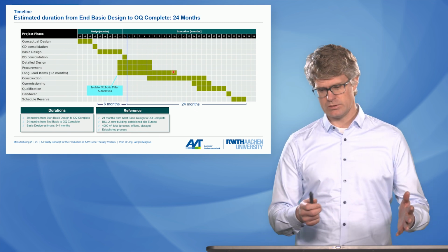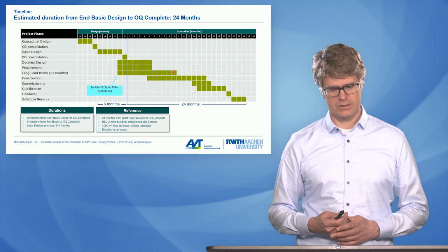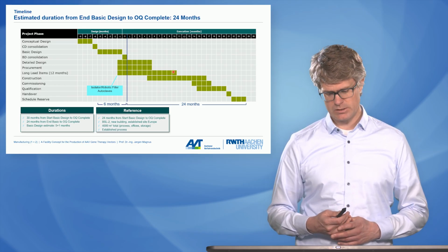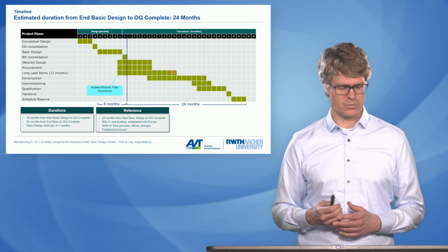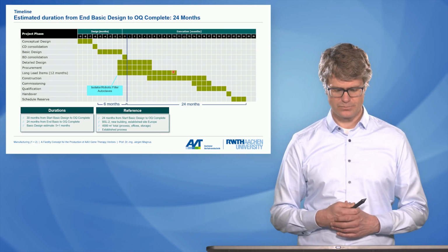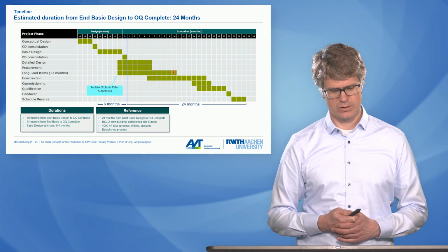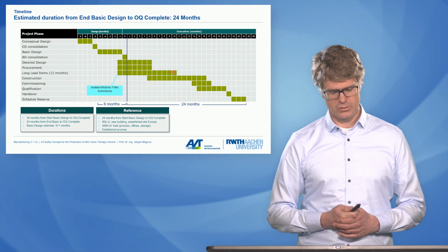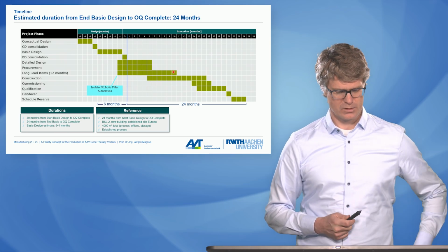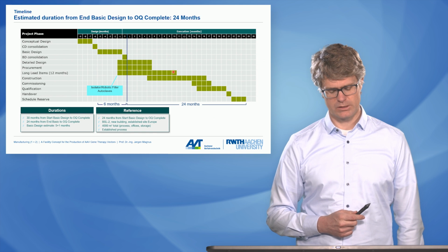So with those assumptions, we have a very short building time, and it's ambitious to say 30 months from start of basic design to end of operational qualification, but it should be possible. It depends on a number of factors, also any kind of problems or how well you can organize the execution of the project.